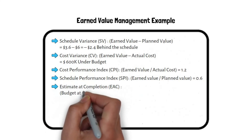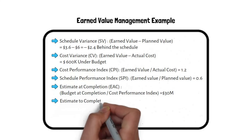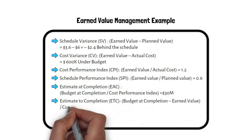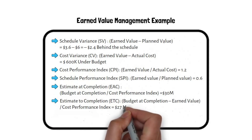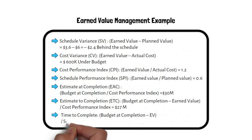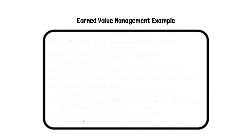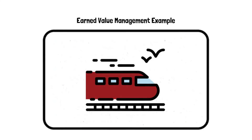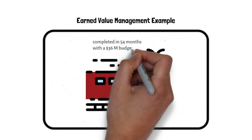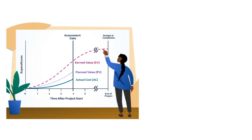Schedule Performance Index: EV divided by PV equals 0.6. Estimate at Completion: Budget at Completion divided by CPI equals 30 million dollars. Estimate to Complete: Budget at Completion minus EV divided by CPI equals 27 million dollars. Time to Complete: Budget at Completion minus EV divided by SPI equals 54 months. Taking this performance into consideration, this railway project will be completed in 54 months with a 36 million dollar budget.